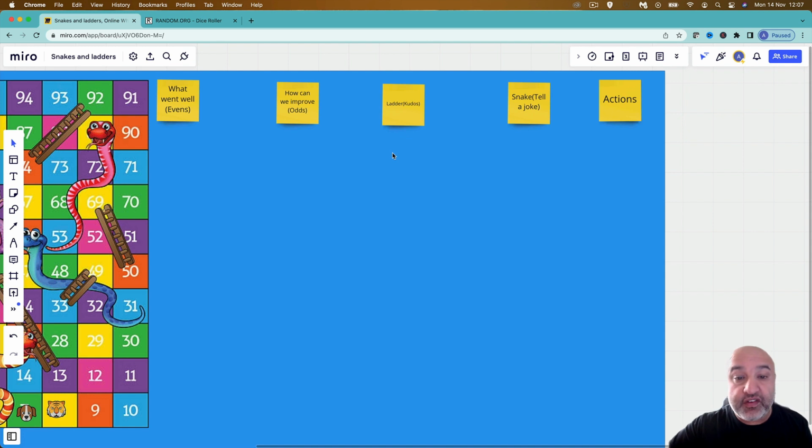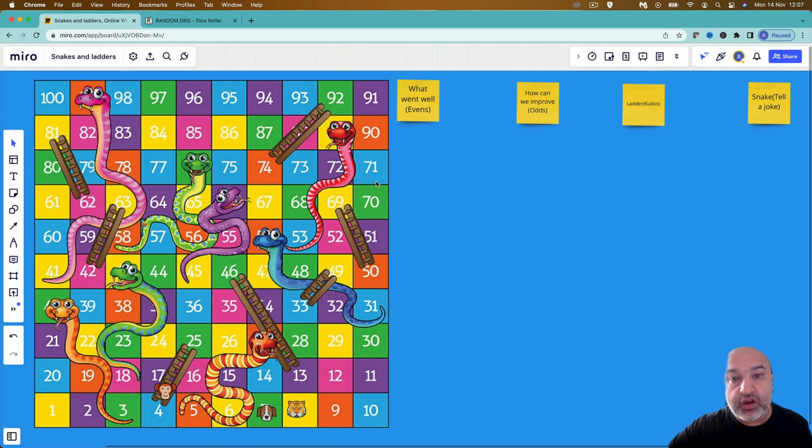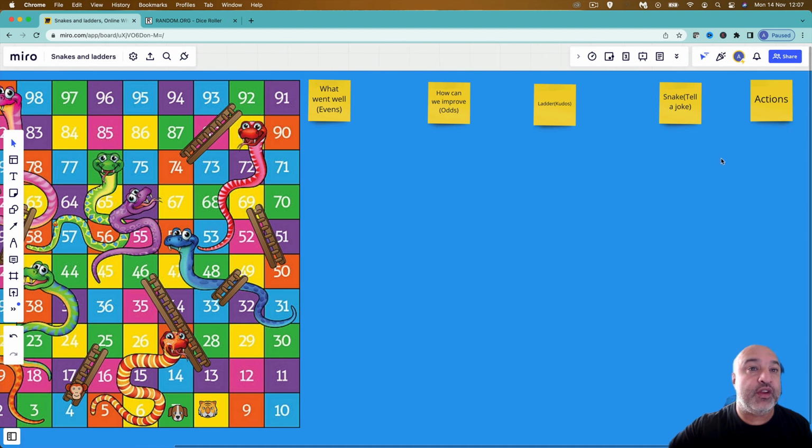Try different things with your teams, ask them for feedback, what they think may be useful, rather than just trying to dictate what it should be. The idea is that if you're running a retro for 1 hour, then maybe run this game for half an hour, I would say. And then after that, we go to the board, look at all the tickets that we have, and understand what actions we're going to take. Depending on how many actions we want to take, 1 or 2, we do a dot vote and pick the 2 highly valuable actions that we're going to take into the next sprint.